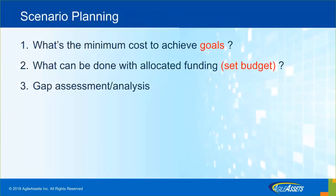The goal of an investment strategy is to have more preservation work. As a bridge engineer or bridge planner, I have three key questions. First, what is the minimum cost to achieve the goals or targets? Second, what can I do with the current or projected budget? Third, the gap analysis — how much more money do you need to achieve your goals, or how much do you need to sacrifice your goals and adjust your targets? Many high-level managers need this gap analysis to go and ask for more funding.